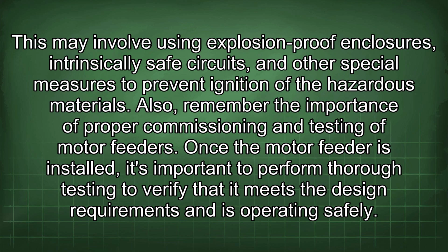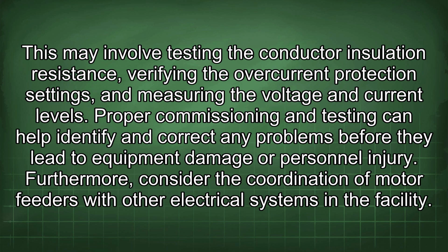Also, remember the importance of proper commissioning and testing of motor feeders. Once the motor feeder is installed, it's important to perform thorough testing to verify that it meets the design requirements and is operating safely. This may involve testing the conductor insulation resistance, verifying the overcurrent protection settings, and measuring the voltage and current levels. Proper commissioning and testing can help identify and correct any problems before they lead to equipment